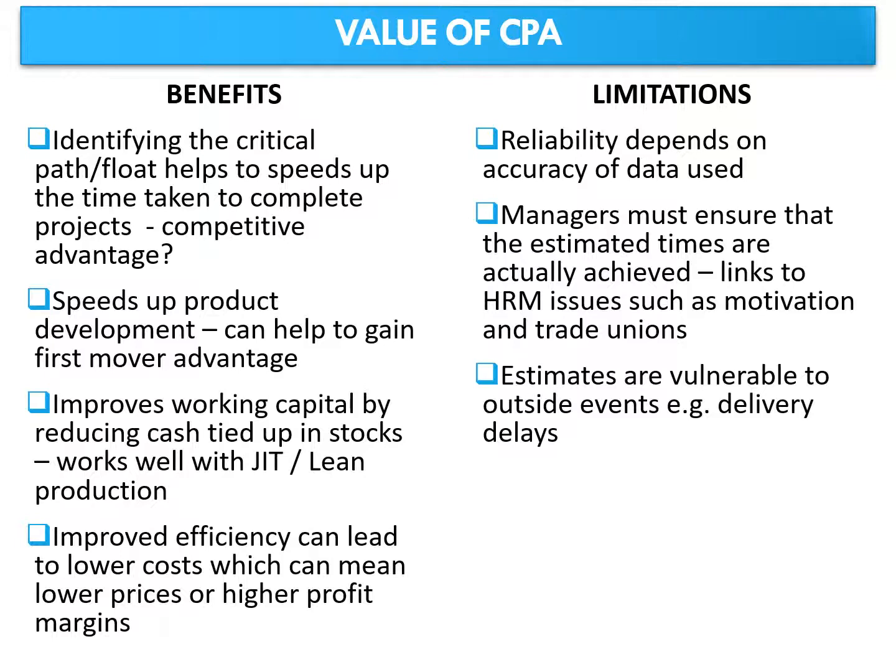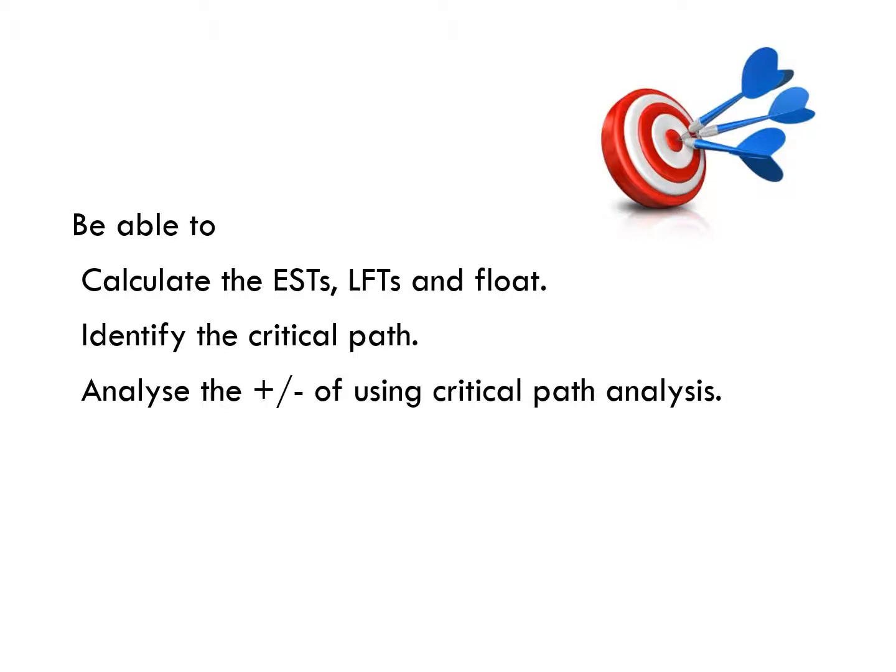The estimates are vulnerable to outside events. For example, if one of our activities or tasks is to make an order for deliveries and there is some form of delay, it's going to upset the critical path of our project.